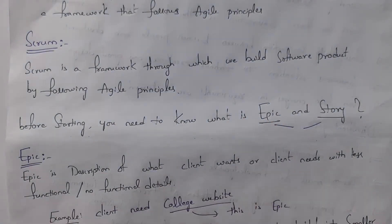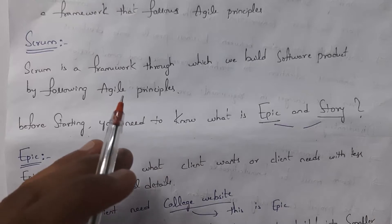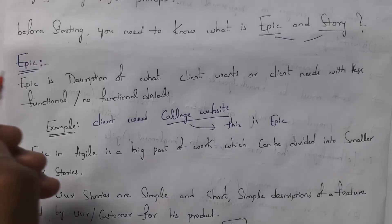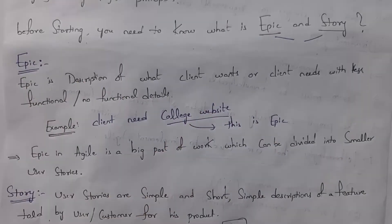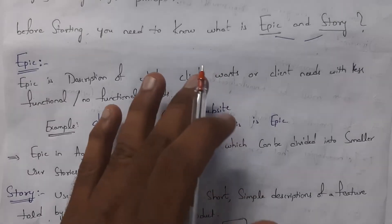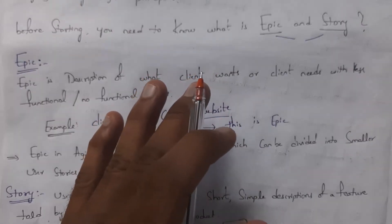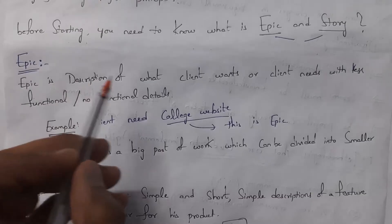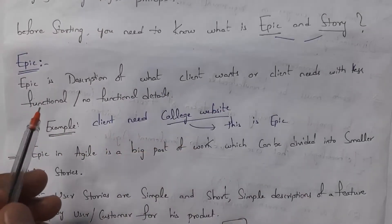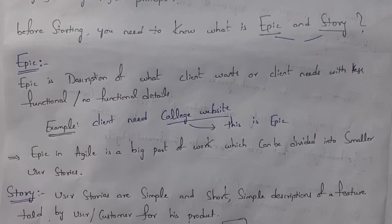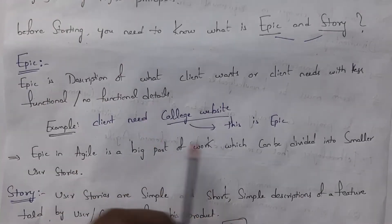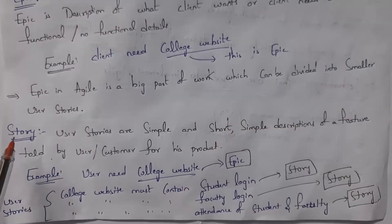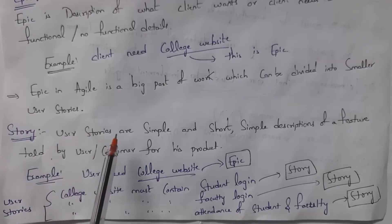Before explaining Scrum further, you need to know what an Epic and a Story are. For example, if I am a college owner and I tell a product manager 'I want college software,' that is considered an Epic. An Epic is a description of what the client wants or needs, with little or no functionality details. This big work can then be divided into smaller user stories, where each story describes one feature.